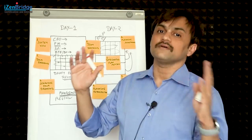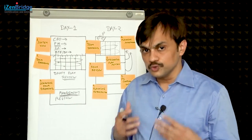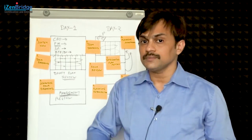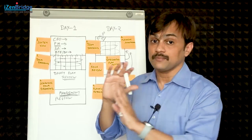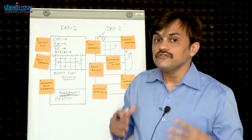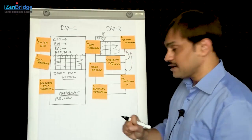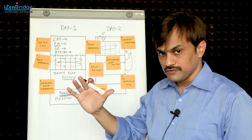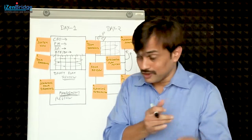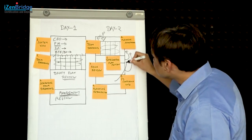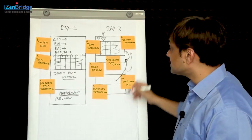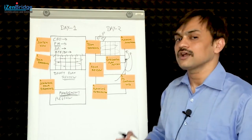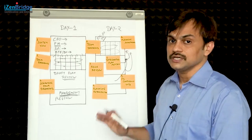Once we see team-level confidence coming in, we also take a program-level confidence vote. How confident do you feel that we are going to achieve the overall program-level objective - not only yours, but looking at the type of work planned and the type of milestones planned, how confident are you in achieving that? We take a fist of five kind of vote, one to five - one is less confidence and five is more confidence - and if you have a lot of less confidence, that again can trigger a rework. We may need to rework until we reach a stage where we solve that confidence-related problem and are confident enough to go for this particular PI.